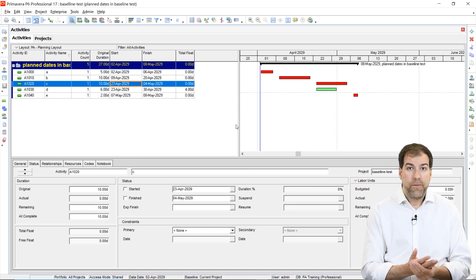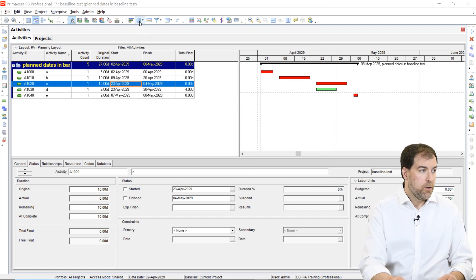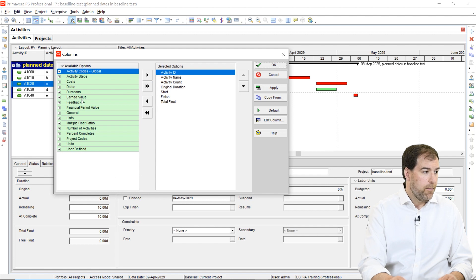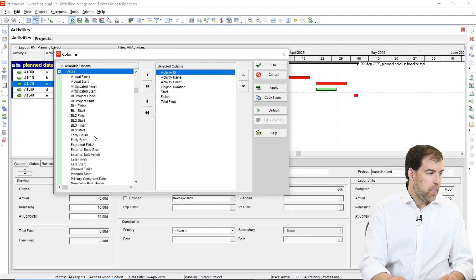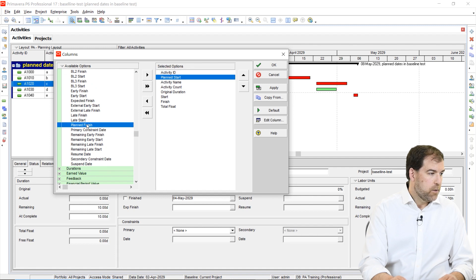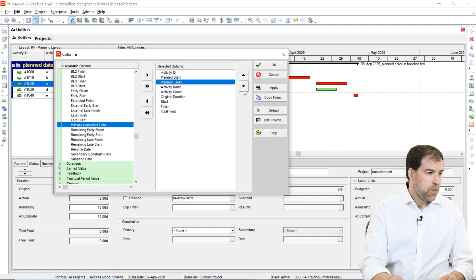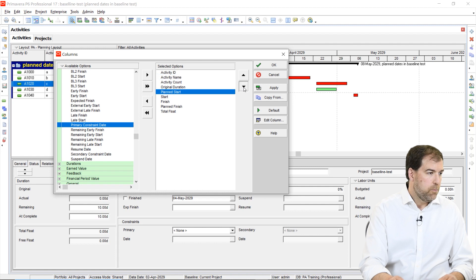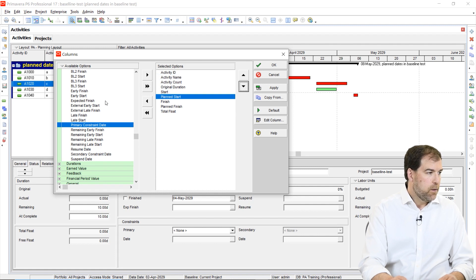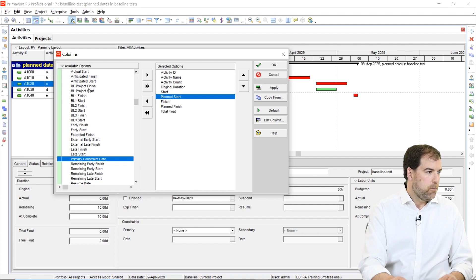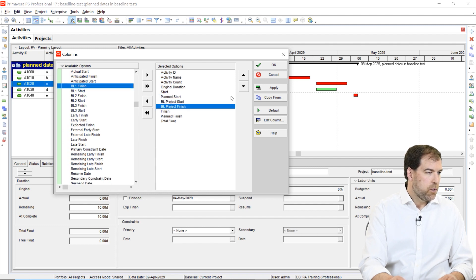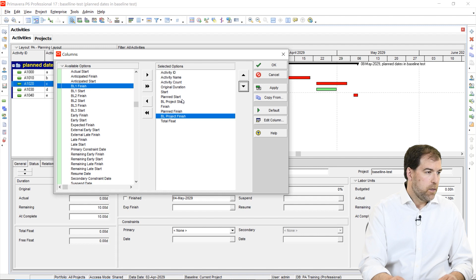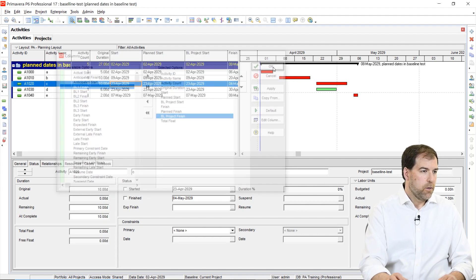What are planned dates? Well, they are fields that we can pull up in P6. So let's go ahead and grab them in the column chooser. Just go into dates here and I'm going to grab plan start and plan finish. And I'm going to start to kind of build a bit of a layout here for you. At the same time, since we're going to do a lot of work with baselines, we're going to pull up our baseline start and our baseline finish. And again, I'm going to kind of stagger things like this so that we can do some comparison.